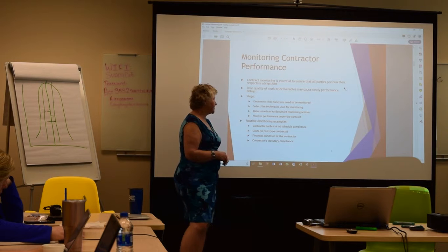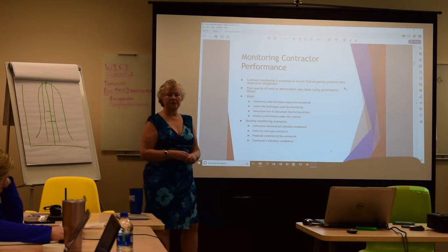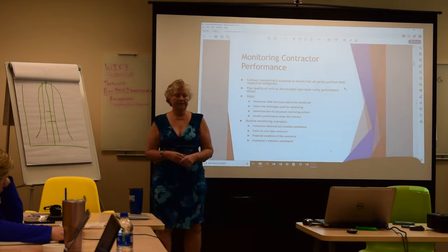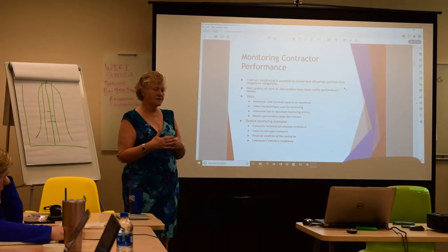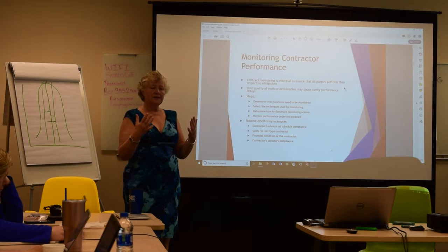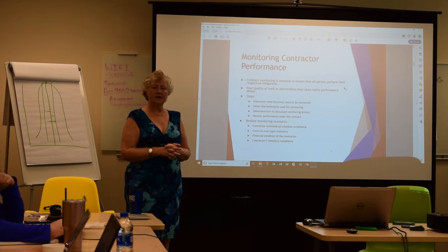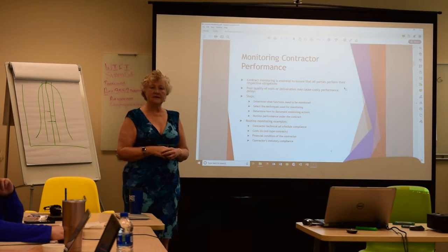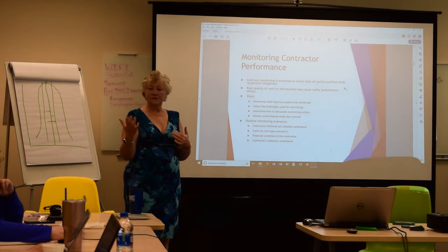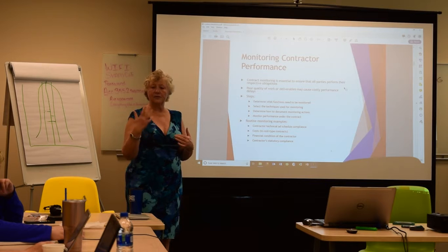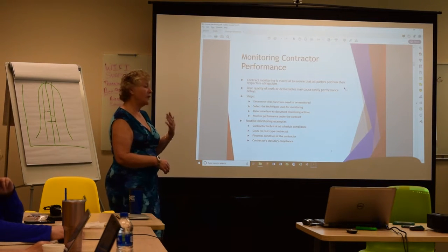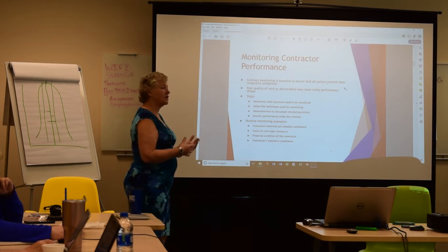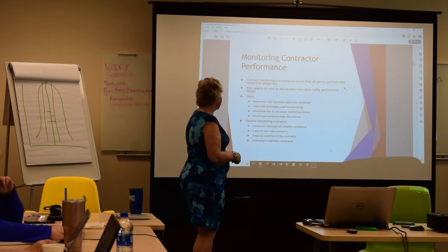They can look at the financial condition of the contractor. So if you came in and they did a financial responsibility analysis on you, decided that you could handle government contracting, and now all of a sudden we're starting to see, we're filing for Chapter 11, that might be situations where they could go back and start monitoring you much more closely to see if their obligations are going to be met. Because if you go under and you can't perform the work, they have a risk of not meeting their mission.